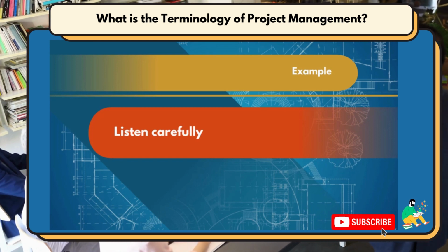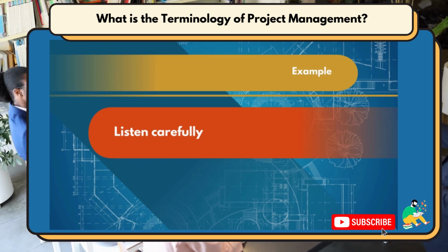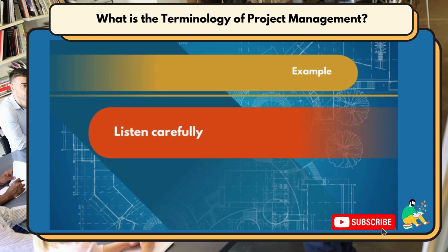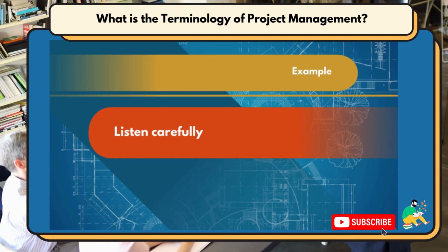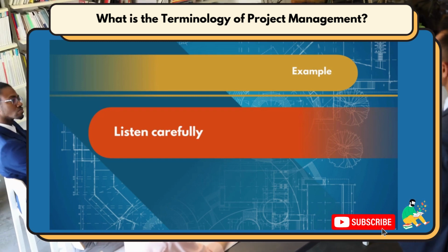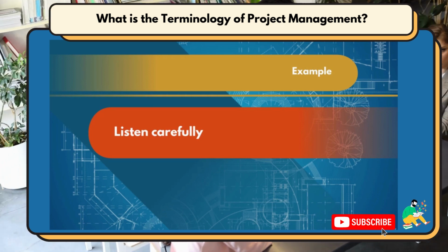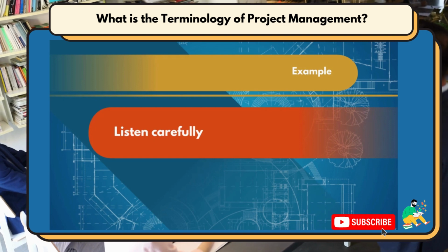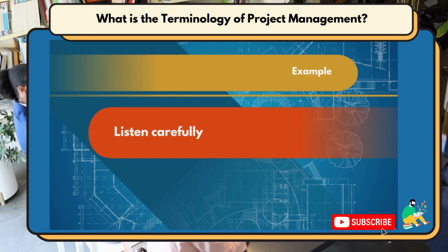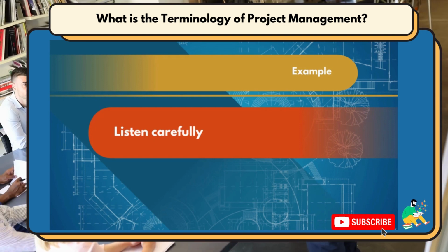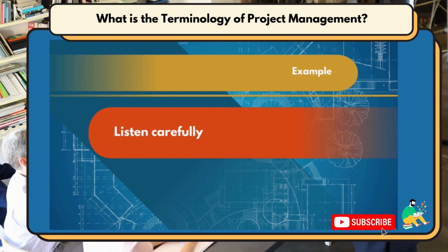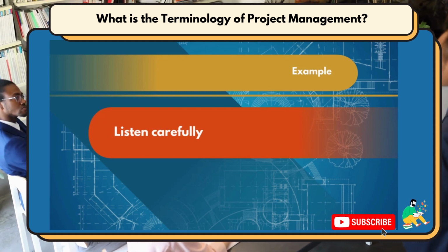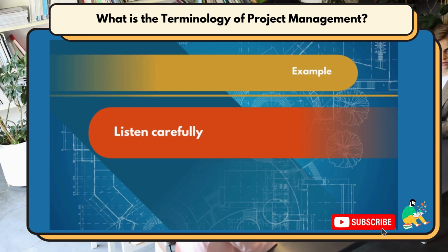The role and importance of a PMO unit can also be diverse. A PMO will have a strategic role if they are responsible for project selection and project portfolio management. Or it can have a more execution-focused role when given the responsibility to lead the project management. The role is to assist, where the PMO employees help by reporting on project progress and keeping the project work within established standards.